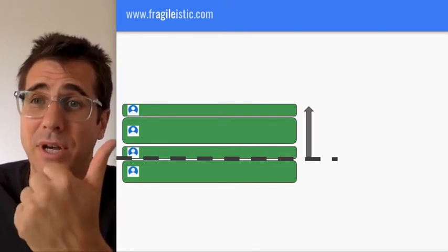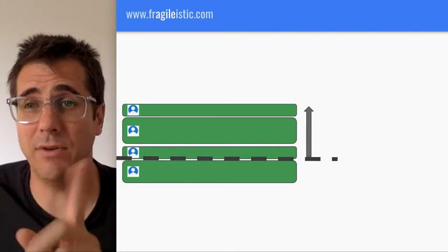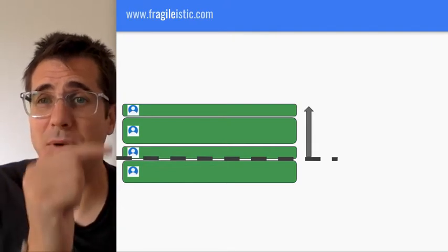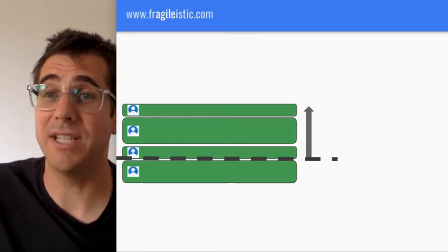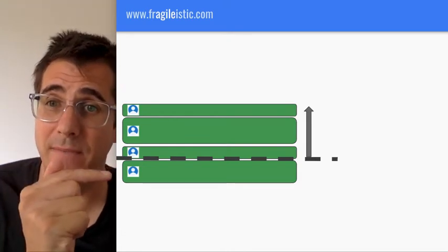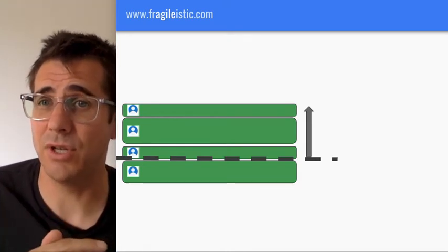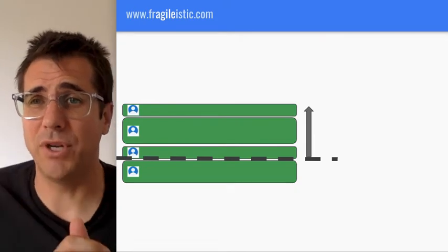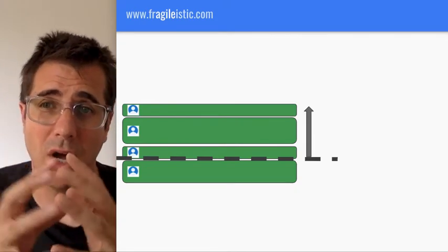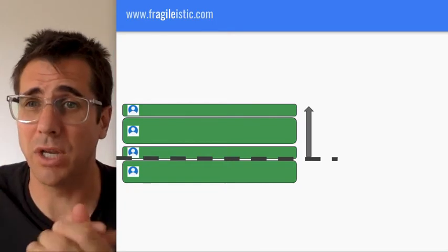We've created a sprint backlog. So these are Jira, 3 user stories are now in a sprint backlog, because we said those are the top of the backlog. And the idea is the next iteration will take this little baby here and any others that have been added, and that will be the next iteration. So that's how sprints work. They work on user stories. They work on cards that are smaller than 2 weeks if you're working a 2-week sprint.